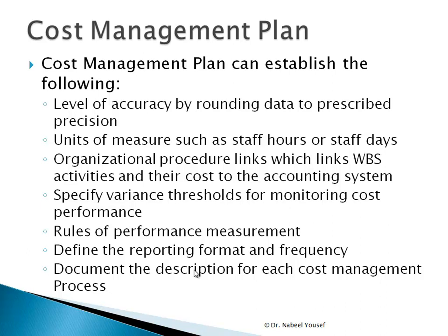Once we start looking at the activities and have the work breakdown structure, we start developing a cost management plan to estimate the cost for each activity. The cost management plan can establish the following. First of all, the level of accuracy, by rounding data to a prescribed precision. We want it to be within a certain range and within a certain accuracy.